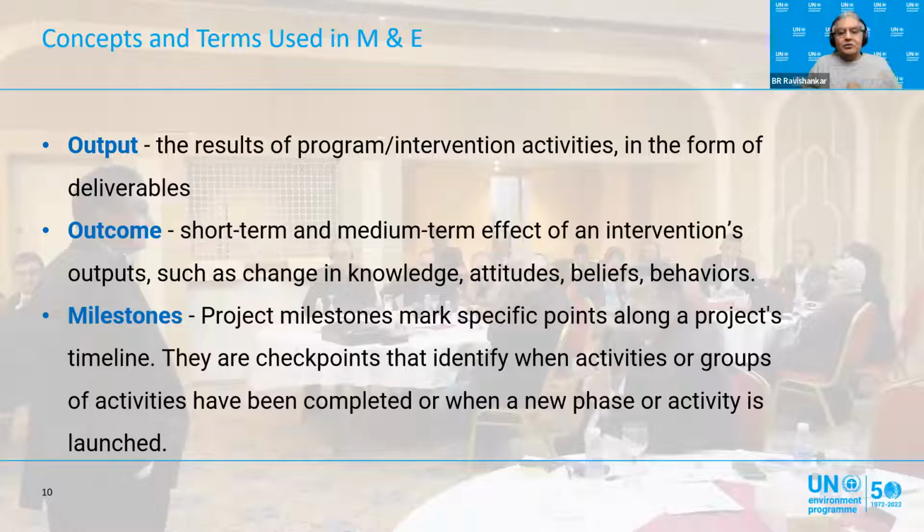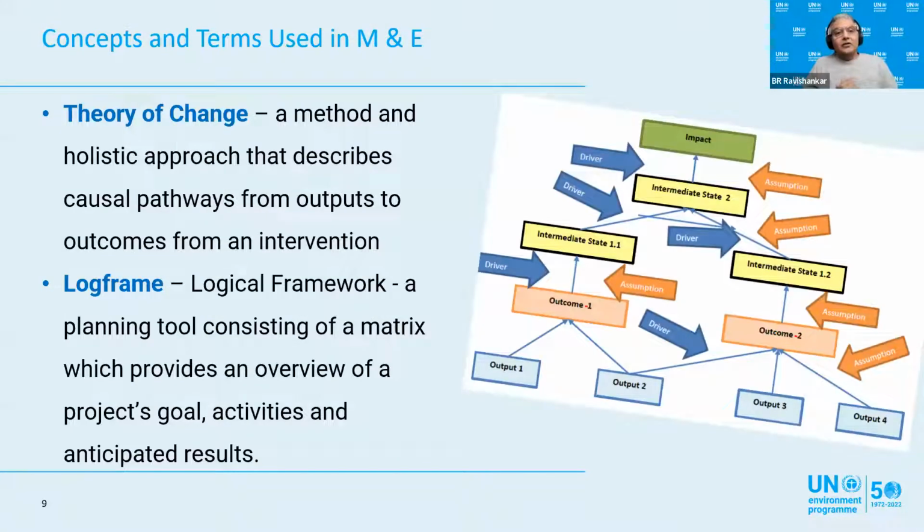So that's why these milestones are important. Coming back to the theory of change, when you have an output, you have these deliverables, and an outcome is something that is medium to long-term or short-term to medium-term impact because of your project. Then how is that going to have a long-term impact on the area? If it is a contaminated sites project, once the cleanup is done, that area can be reclaimed and rehabilitated. Maybe a park can be built, maybe houses can be built, all kinds of long-term impact can happen.